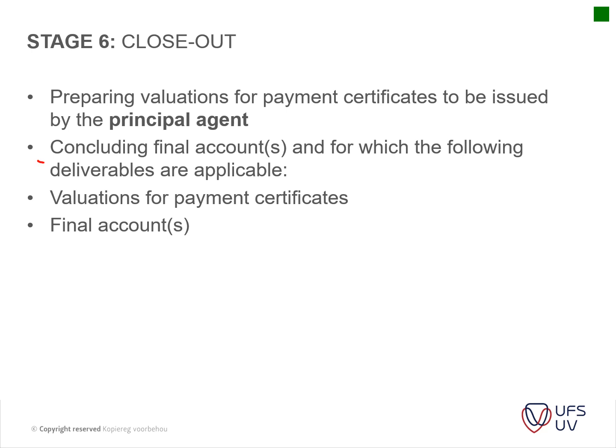It basically comes down to the final account, valuation of payment certificates, and then the final account. And if the QS does his work throughout the project, this is usually a smooth process because the final account is already done before the project is actually closed out. There's no back and forth between him and the contractor, and negotiations and so on is usually sorted out. And then, very importantly, the final account is then used by the QS whenever he does new calculations for a new project.